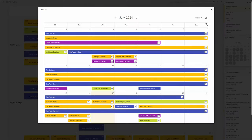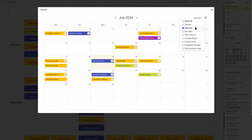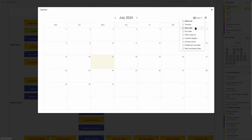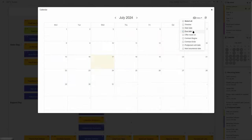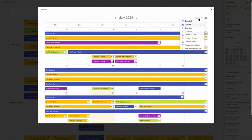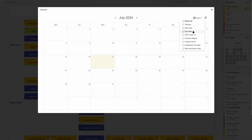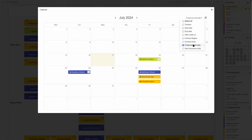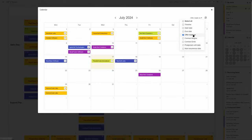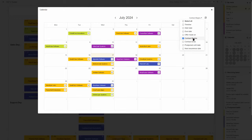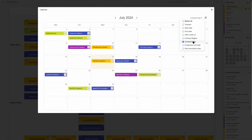Let's look at it a little closer. If your tasks have both a start date and a due date, you'll be able to see those items' timelines, presenting when the task is active as well as which team member was assigned to it. Furthermore, when using the recurring and postponed tasks power-ups, the large calendar will allow you to see when specific work elements are set to return to the board, letting you better prepare for their execution.